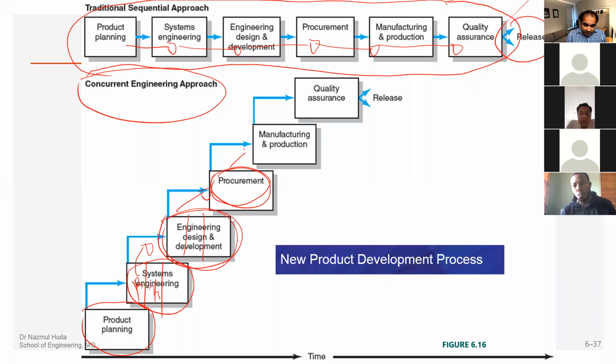And then the next step is manufacturing and production. The manufacturing and production team are very closely linked with the procurement team. They know exactly what the lead time is, when all the bits and pieces are coming, and they can start the fabrication and manufacturing process. They don't need to wait until all the procurement is finished before they start manufacturing. That is not usual practice, and they are wasting time. So they can start planning as early as the procurement team takes control of what is needed, and the manufacturing team will start planning and preparation accordingly.